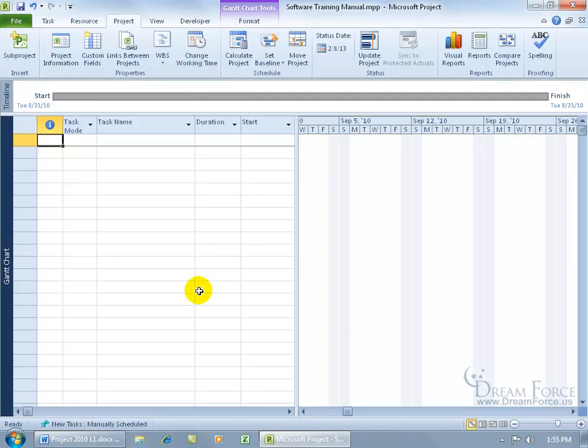In any case, we want to be able to take that base calendar that we have all these exception days and non-default work days assigned to it and apply it to this project here. Because by default it's got the standard template and it doesn't have our base calendar assigned to it. So to assign that base calendar to the project, so when we start scheduling our tasks, they don't work on those non-working days or those holidays, then come up here on the Project tab to the Properties group and click